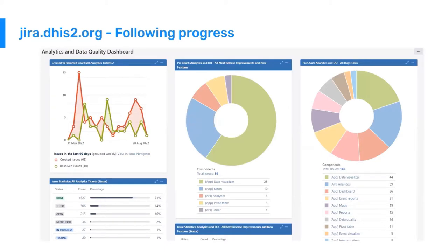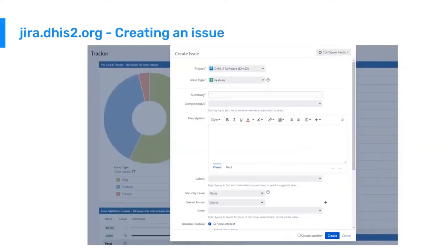Another source for tracking DHIS2 functionality as it's being worked on is our open Jira. Anyone can make an account or browse anonymously, and there are multiple dashboards available to follow specific functionality being worked on. This is where the software development team tracks its own progress — each functionality is broken down into specific tickets and issues within Jira where you can get the details of what that functionality will include.